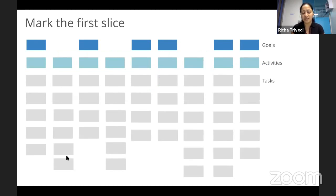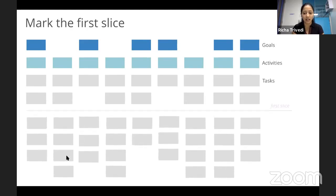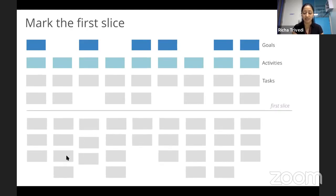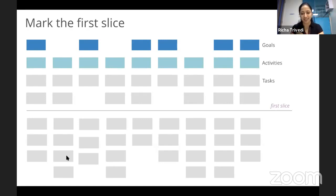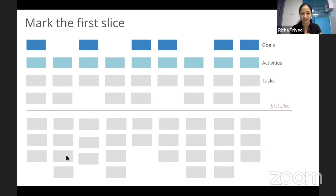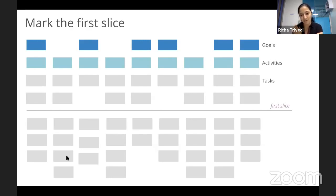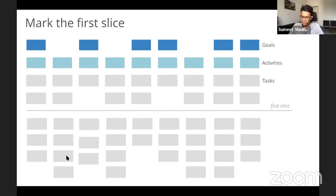The last is mark the first slice. So you will definitely not be doing everything, but mark the first slice in a way which helps you to complete each of the user goals. And not really like go horizontal and not vertical. And like Samit was saying, when you go to the stories, you might get confused when we talk about where we encourage vertical over horizontal, but here just be horizontal. And that's the reason why we said arrange it in order of criticality, because then you do the first items first.